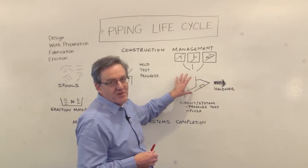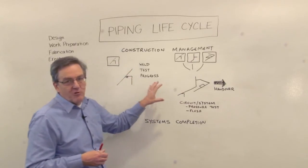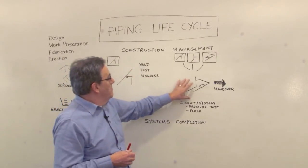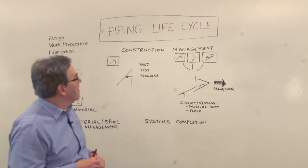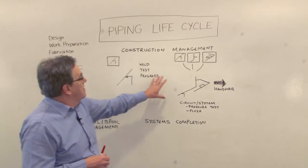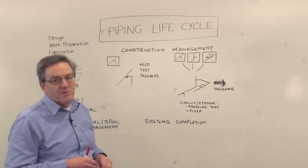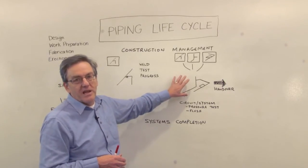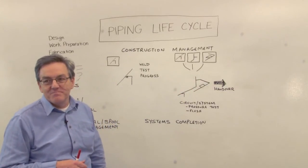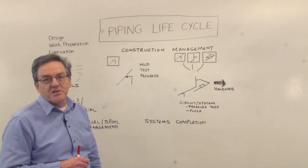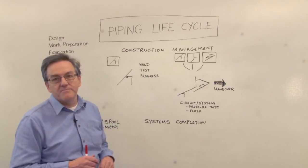The system is an assembly of lines, and there's a further stage of making sure that the system as a whole is certified, documented, and ready to be signed off for handover to the owner-operator who is going to operate this plant. They need documentation, the history, the audit trail — they need to understand all the decisions that were made, because in the unlikely event that something goes wrong you need traceability to come back to it. Essentially, what we've done at this point is replicated the 3D model that we started with in the plant, and it's ready to go — good for the next 50 years. That's the end of this series; I hope you've enjoyed watching this process of the piping life cycle. Thank you.